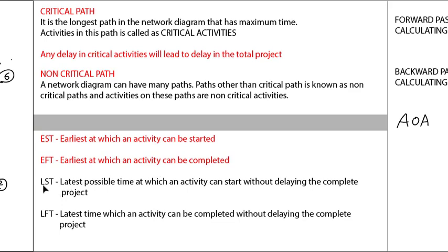Similarly, we have late start time and late finish time. Late start time is the latest possible time at which an activity can start, but it should not delay the complete project. It can start late, but it should not delay the complete project. Keep that in mind. And the last one is LFT, the latest time that an activity can be completed, but here also there should be no delay in the complete project. So that is EST, EFT, LST, LFT.